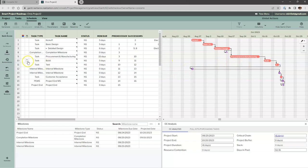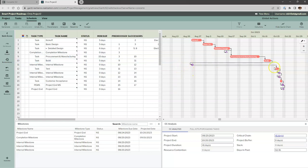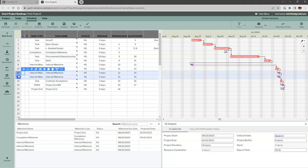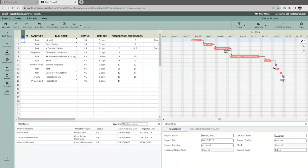An internal milestone is not locked in place — it's a milestone that will move with the project but give some projection as to when this activity will happen. I'll come here to 'Test,' insert a special task — internal milestone — and submit. After a couple of corrections placing it in the wrong spot, we now have the internal milestone correctly placed between build and test.